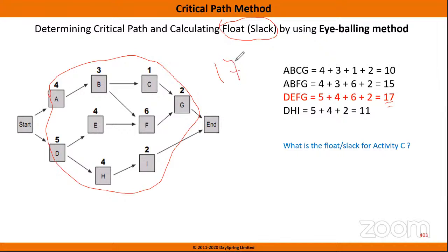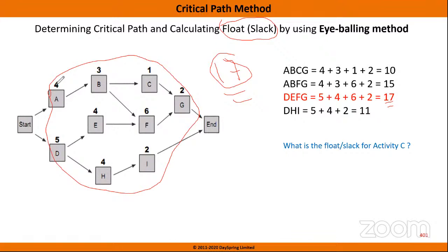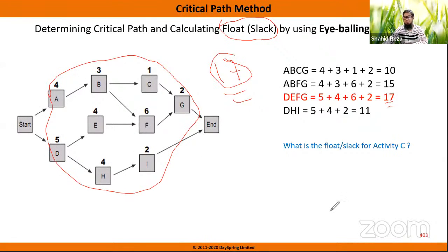17, the critical path, actually. That's what we are calculating, the critical path. Why? Because the critical path actually is the project duration. All right, so 17 days, we have to have 17 days to complete the project. So that's why you are calculating the critical path, to find out the project schedule. The critical path is the longest path, meaning the minimum time the project will take to finish all activities of the project. So this is the total project duration. So critical path equals project duration.